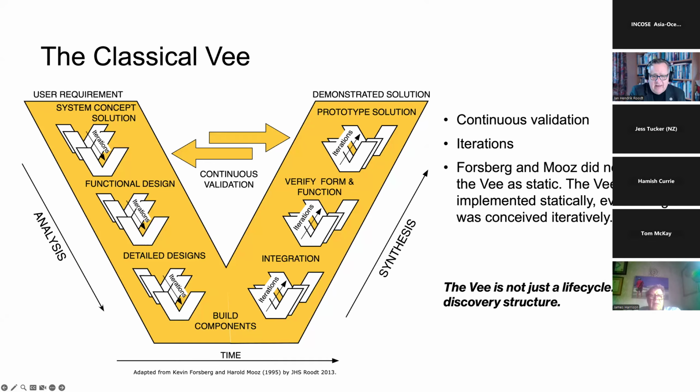So what is verification, validation, accreditation? I'll keep it simple from my perspective. I think verification proves that we've built it right. Validation proves we built the right thing. And accreditation is often missed out in the discussions, but that's the part that decides whether the remaining risk is acceptable and who will carry it. Right? And so the verification is really conformance to spec. Validation is satisfaction of a stakeholder need in the context, and accreditation is acceptance of residual risk.